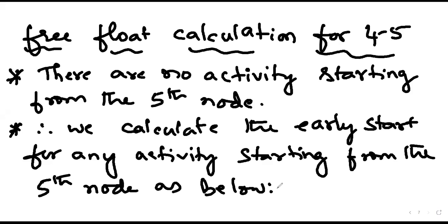Only that we have to compare the early finish of the three activities, and whichever is the maximum, that will be the early start for the activity that starts from the fifth node. So what should be the early start for the activity that starts from the fifth node? It is nothing but what we have done in the previous calculation.